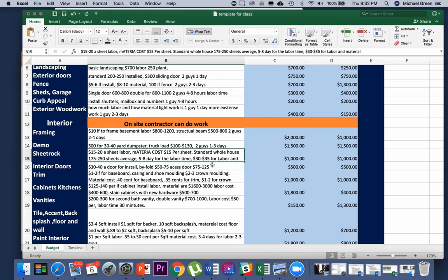So this is what we pay to install them, but then we have to buy them. If you're actually buying a door, usually we can just round that up to about $100 for an interior door. We can get them cheaper depending on size, but if we just say that a door is going to be about $140 installed, and we know we have 10 interior doors that we need to completely rip out and replace with new ones, that's going to be about $1,400 for 10 doors. So we throw some money in and we know what we're dealing with. That's if we need all new doors. If you have good doors throughout the house, it is very possible that you could just replace a couple of broken doors.